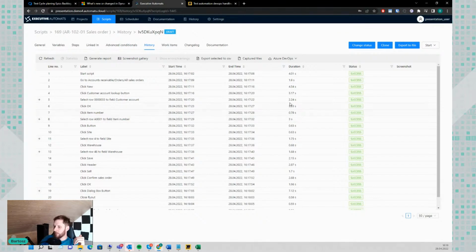We were able to create a massive amount of transactions on a tier 5 environment, and we were able to drag down 6 of 12 AOSs of the tier 5 environment to show that the amount of hardware prepared for go-live was not adequate. So there are significant values for you if you are planning to verify whether you are ready for go-live from the performance perspective, and ready for the rollout.